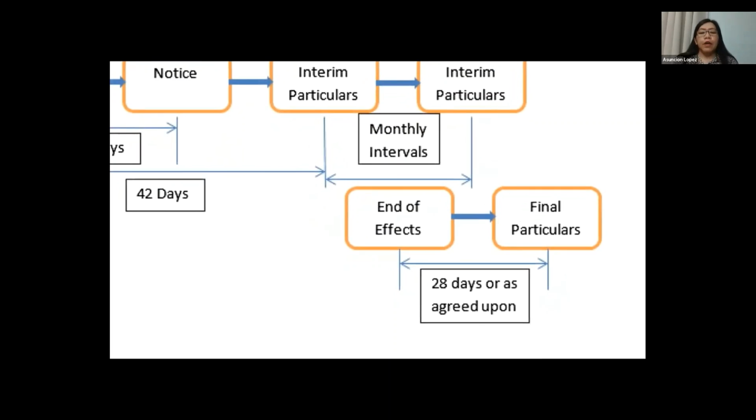Now, let's say the COVID-19 will end in December 2021. From the end of the effect of that event, the contractor has 28 days to submit the final particulars.